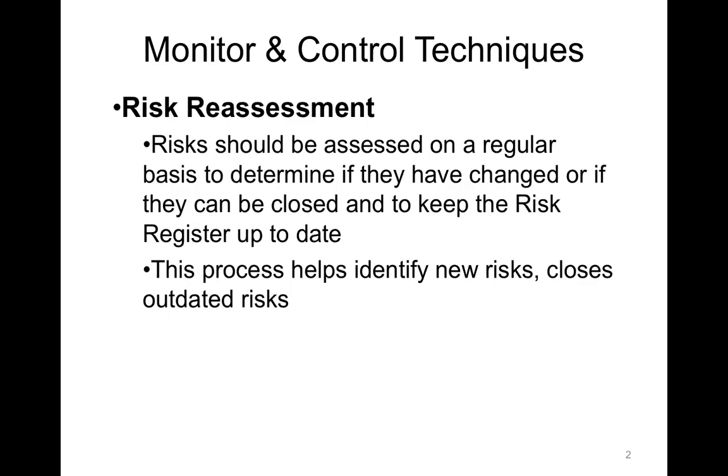Let's start with, first of all, risk reassessment. What is risk reassessment? Essentially, it's the process of reviewing risks that you've already identified and determining how those are changing throughout the project. So how the risks, the individual risk events, are they changing? Are some risk events no longer valid, or they've become obsolete during the project lifecycle? Have they escalated and gotten worse? Have they gotten better? Have some threats turned into opportunities? Have some opportunities turned into threats? So you're reassessing those risks, and along the way, you're inevitably going to identify new risks as a result of the reassessment process.